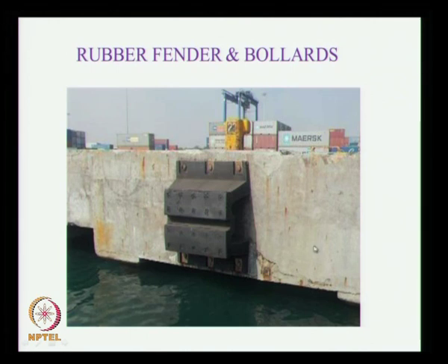We are now carrying out the study to find out what is the repair procedure that can be carried out. This repair procedure is typically about 10,000 rupees per square meter. If you take 1 square meter of area, the cost of repair is approximately around 10,000 rupees, depending on the type of repair which you are doing. There are different types of fenders that we will discuss in a separate class, and these are the bolts which are used to fix the fender.